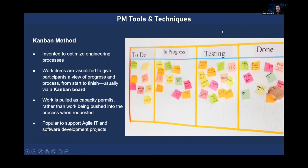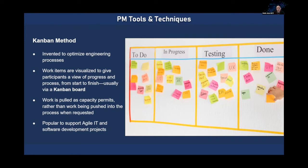As your tasks are moved from a to-do list to in-progress, you can also have a testing phase, and once it passes testing, you move it into done. With our work at FEMA, we have a backlog that we call 'on the radar,' and then there's a sprint to-do list. At the beginning of the sprint, everyone on the team moves over their cards that they intend to tackle over the next two-week sprint cycle. As tasks are completed, they're moved into a done column, and anyone on the team can visually see the tasks chosen for that sprint and where they are in the process.